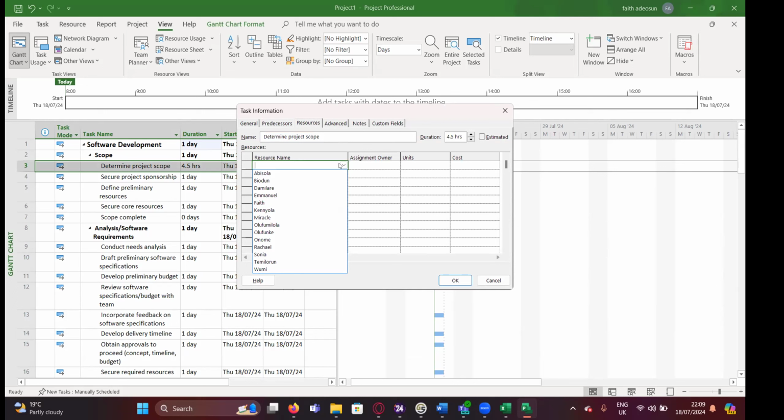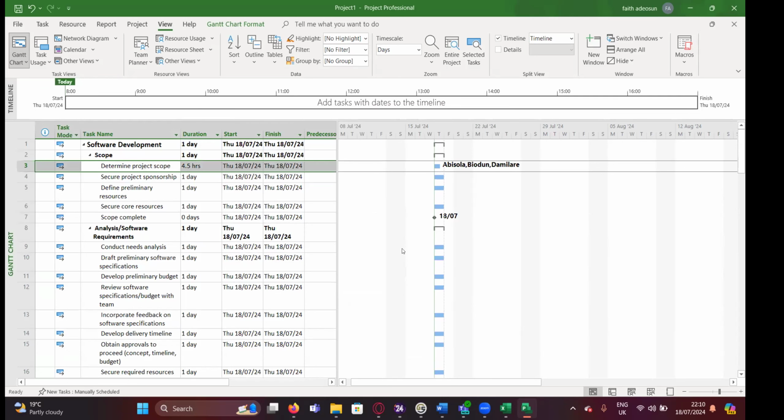Okay, so let's assume that we have Bisola, Biodo, and Damilare on this particular project. So you have to click Bisola first. You go to the next line. You click Biodo. Next. Pick up Damilare. Okay, press OK. So you can see now that we've assigned Bisola, Biodo, and Damilare on that particular task. So they are the ones responsible to complete that task.